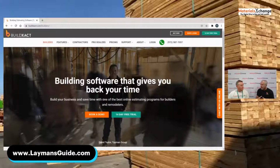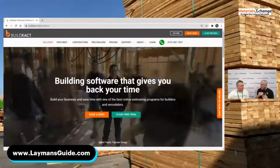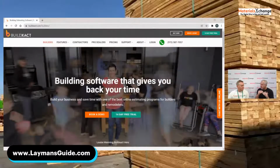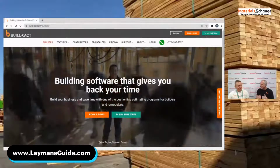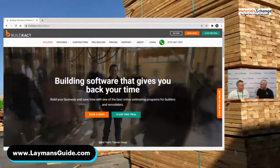And as a result, our research tells us the average builder is adding 20% to his costs, above his margin, just as a risk factor because of the poor quality of information he's got in his project when he's actually got to go out there and win the job. It's actually 20% over his close cost. There you go, right? And then because he's not managing his project, he eats that 20% as well as the rest of the margin. All right, so out of the gates, we're changing from this square foot model.